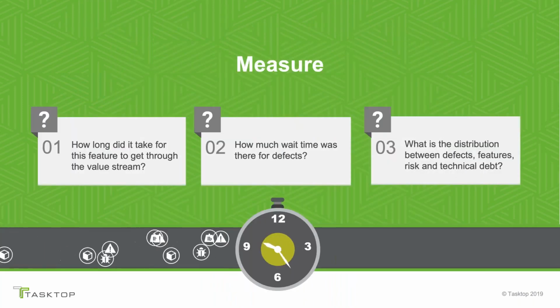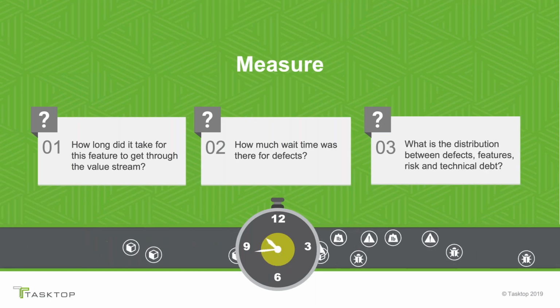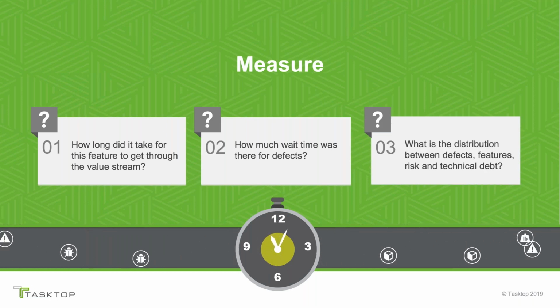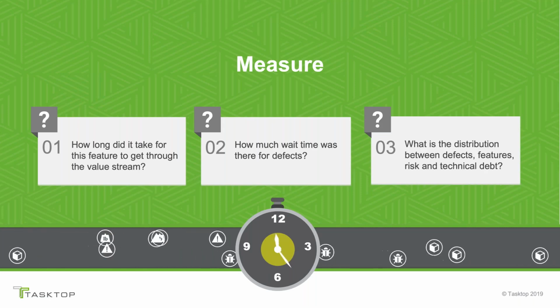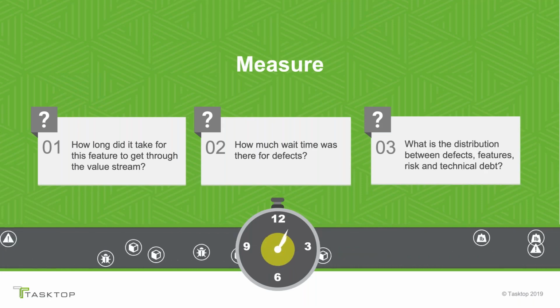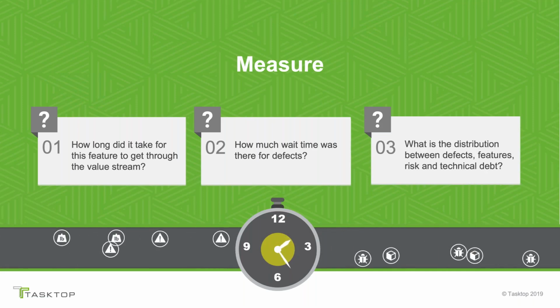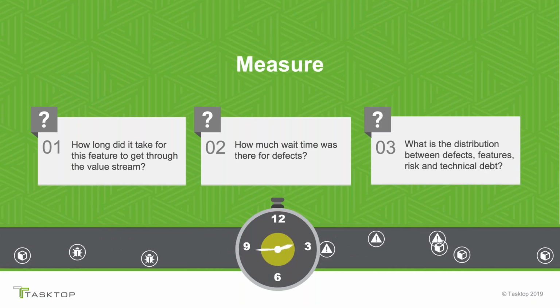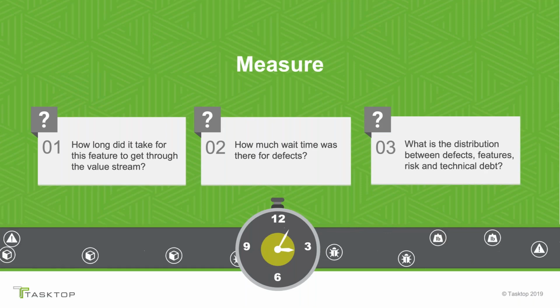Okay. So what happens when you do this? You get to measure things. What are you going to measure? You're going to measure how long did it take for this feature to get through the value stream? How much wait time was there for defects? What is the distribution between the defects, the features, the risks, and the technical debt?